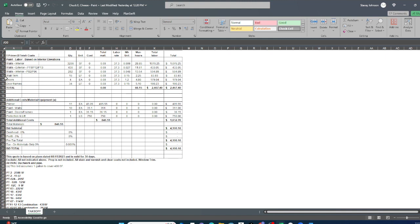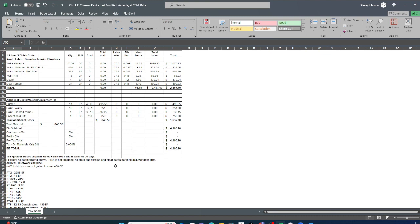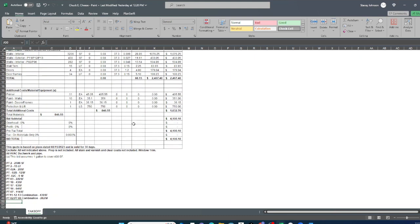All right, painting estimates. So like I said, we break up all the labor and then all of the material. And so all the interior walls, wall trimmed by the linear foot doors each and door frames linear foot. And then the material. Now, it says that we assume that one gallon will paint 400 square feet. So that's how we determine how many and this is gallons. So we know that everything's got to be primed. So we add up how many square foot in total, divide by 400, how many primers. Same thing with the paint all the way down.